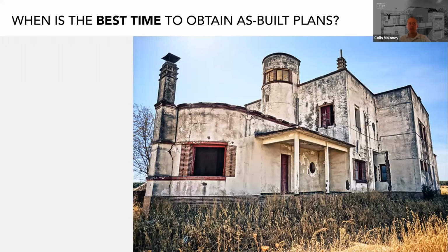When is the best time to obtain as-built plans? In most cases, obtaining as-built files is one of the very first steps in the renovation, if not the first step. Getting ahead of this step allows an architect to focus on their design, plan creation, and submittal to the building department, all of which are considerably more time-consuming than the first step.